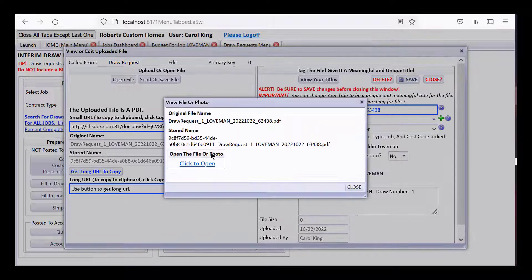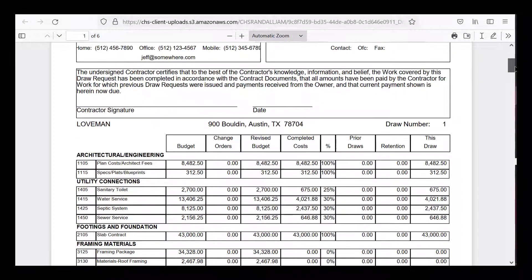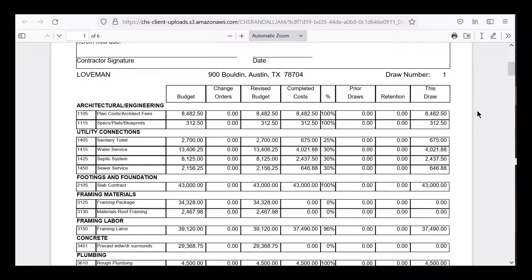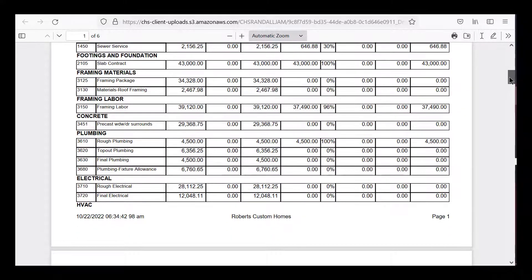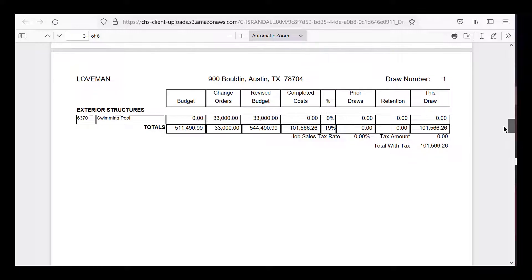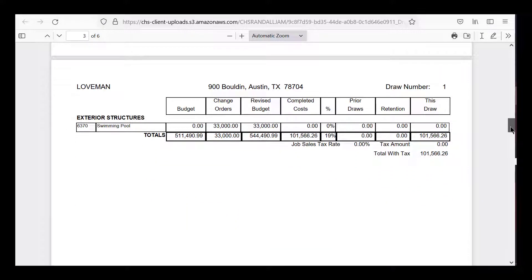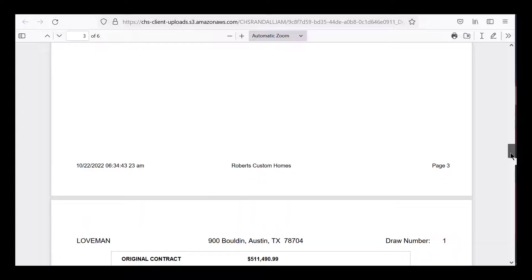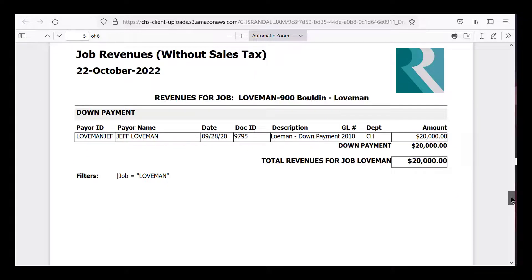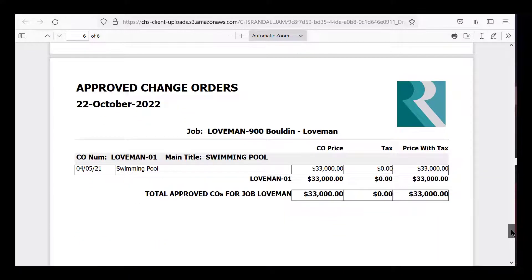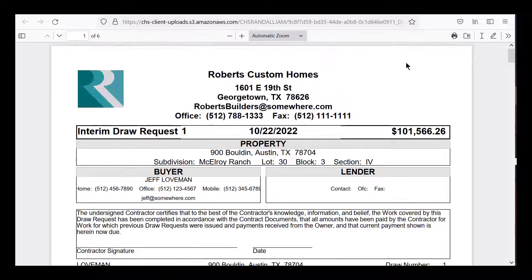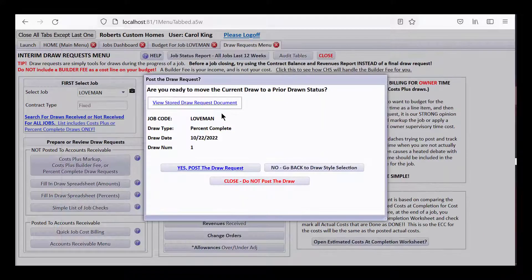Ready to draw is $101,000. Let's store, print, and post the draw request with revenues and change orders. Opening the draw request, it shows draw request one for $101,000, prior draws of zero — next time draw two will move amounts into prior draws. It'll come down with the totals and show all your cost codes. You can load the recommended NHB cost codes and tweak them as needed, or set them up from scratch. Here's the money received so far and the detail of change orders attached to this draw. Let's post the draw request — it'll be stored in your file cabinet and you can send it to the home buyer.